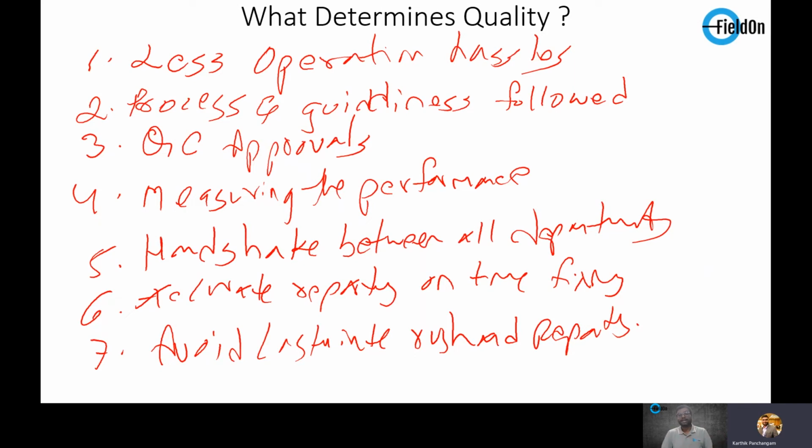I think that point is very valid. Someone mentioned that when you're laying a pipe, understanding the parameters, like if the mat level has been maintained, the depth level has been maintained, and proper markings are being done, will determine the quality of the project.